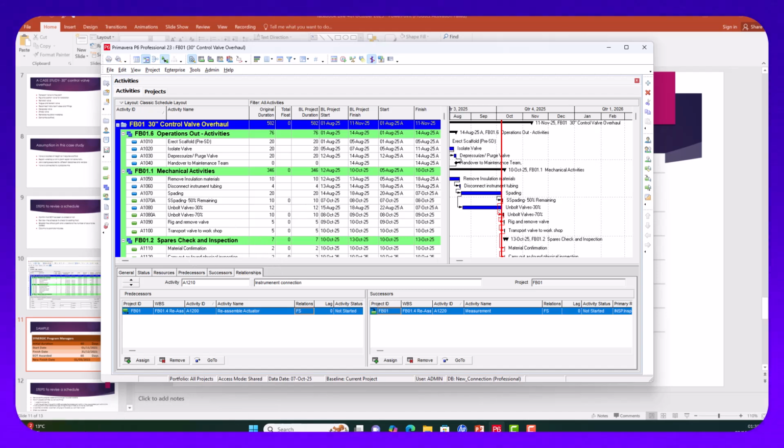That's 2nd of November. Let's see if it's a weekend. Or is a weekend, so we might have to go for 3rd. I have to go for 4th because it will have 2 days. We'll have to go for 4th of November because our calendar is just a corporate calendar, which is Monday to Friday. So the other 2 days, so we're going for 4th. So now we're at 11th and we're going for 4th of November.